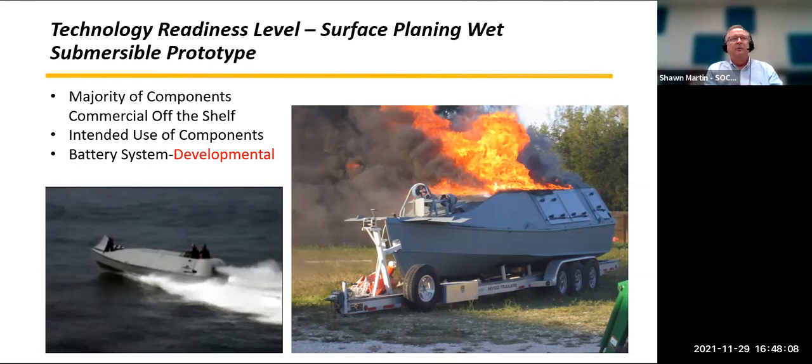In the meantime, we were developing lithium ion. It was lithium ion cobalt, a chemistry battery system with much higher energy density, in parallel. And the idea was to mitigate our risk by doing it in parallel. And once it matured, we would integrate it into the boat.